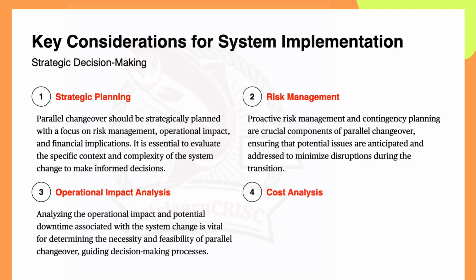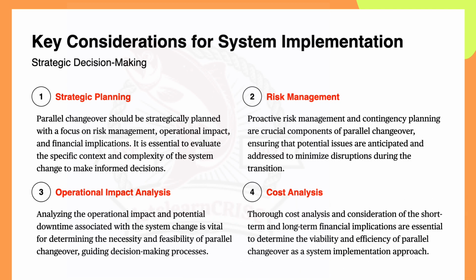Next is about the cost analysis. Friends, conducting a thorough analysis of cost, considering both short-term and long-term financial implications, is essential. So this helps determine if a parallel changeover is financially viable and efficient as a system implementation approach, right? Just taking an example, a cost analysis for a CRM upgrade would involve calculating expenses for software license, training, potential downtime and ongoing maintenance, right? So this information helps make an informed decision on the best implementation strategy,